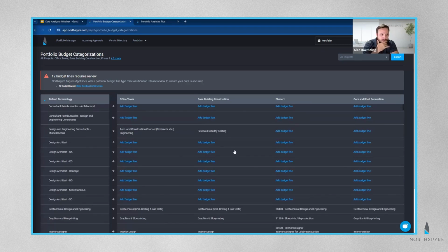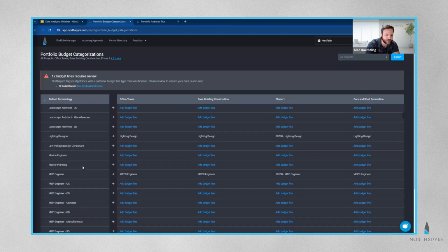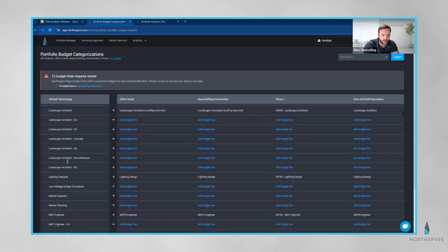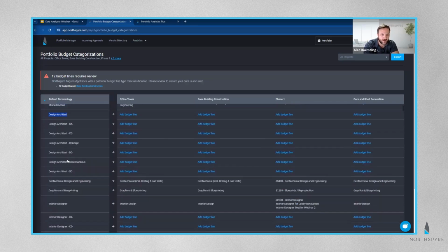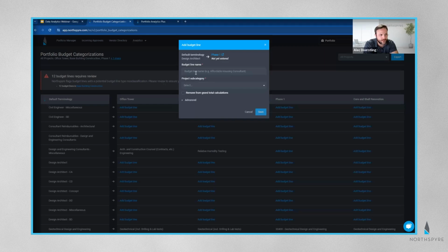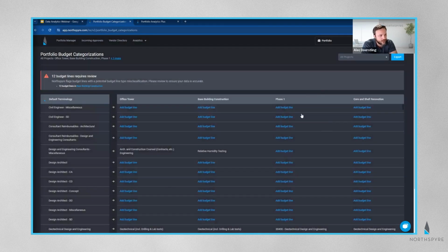And if I need to add any, let's say that on phase one, I know that I have a design architect separate from my project architect. I have architecture underneath project architect, but I also have a design architect. If I need to add a budget line, I can do that right here. I can see, okay, what is that budget line name? What am I naming the budget line? What's the subcategory that I'm adding that budget line to? And then I get a full list of that project and all the budget line types that are there.